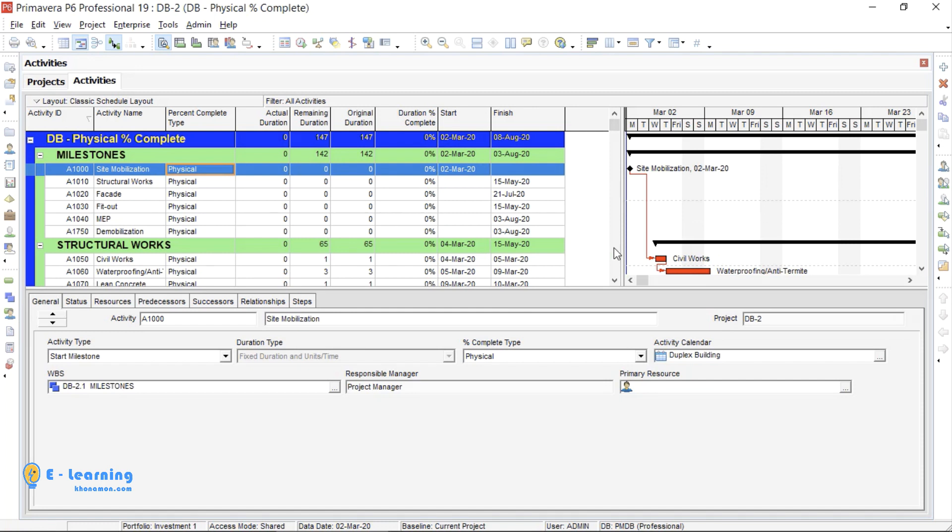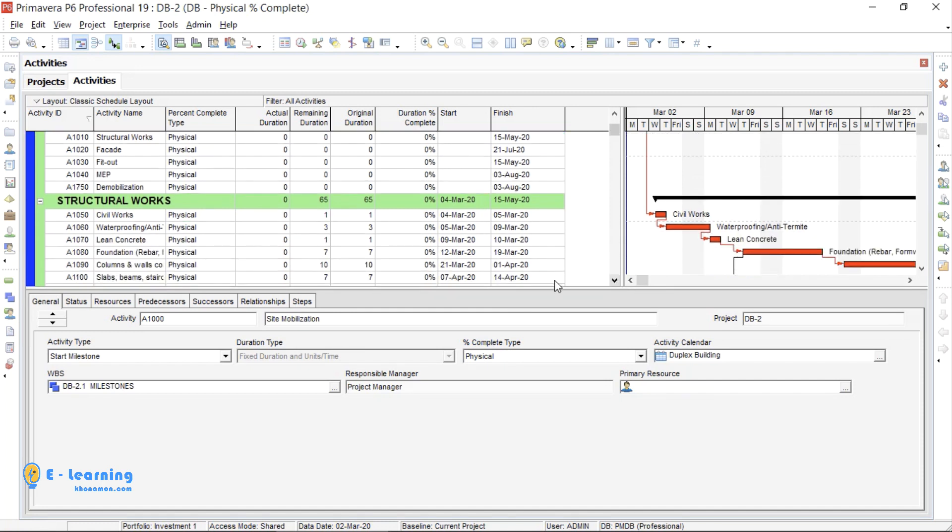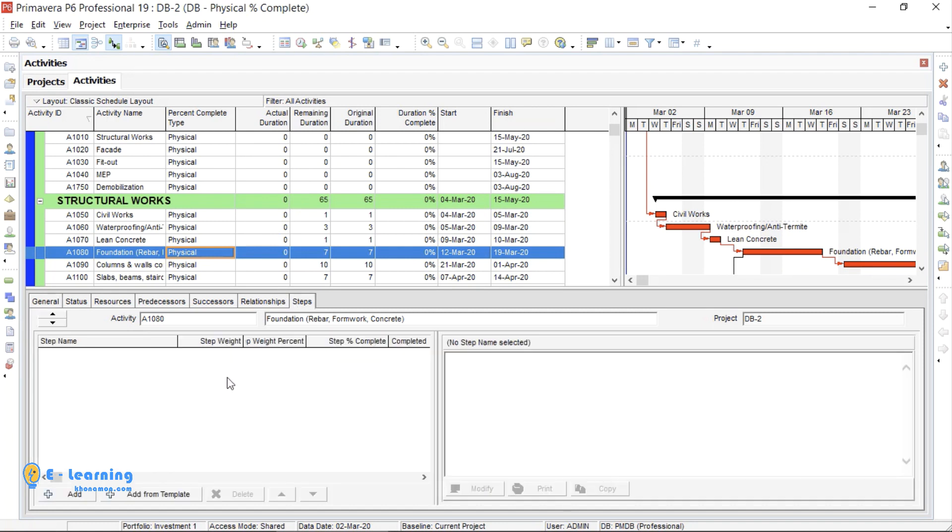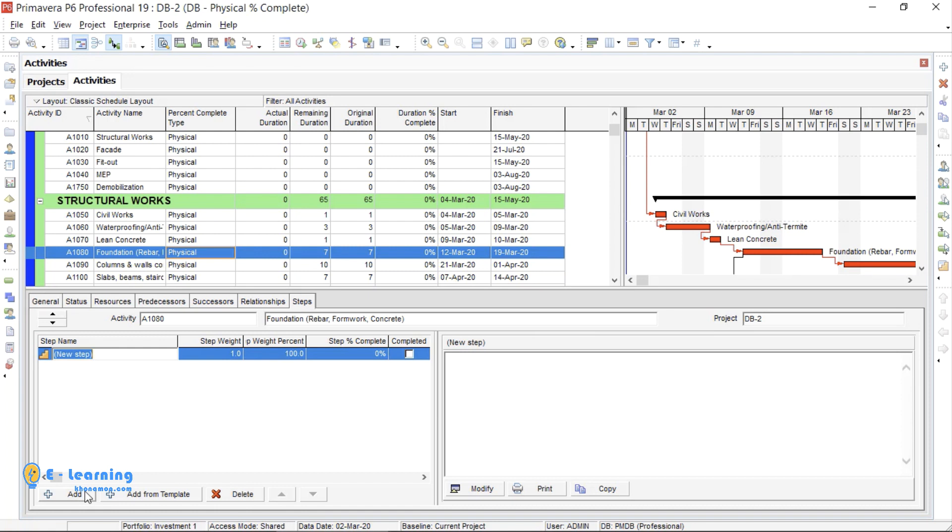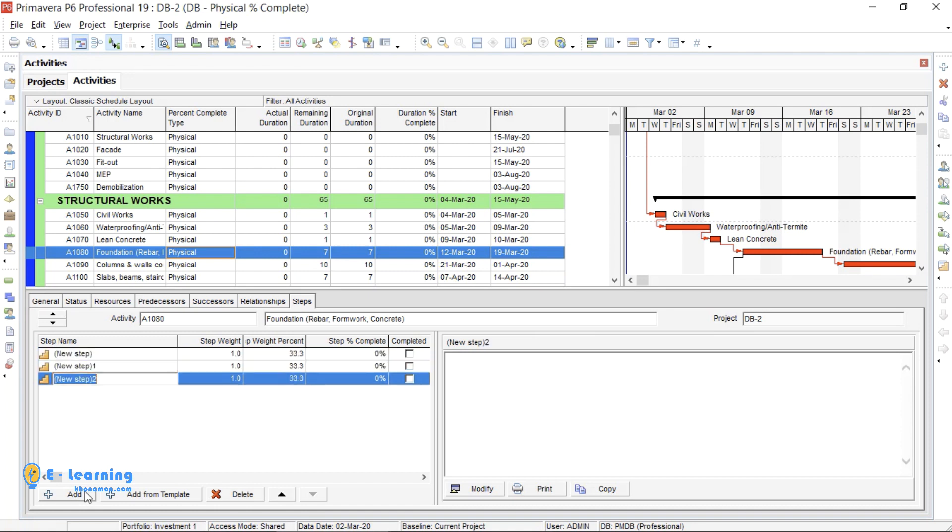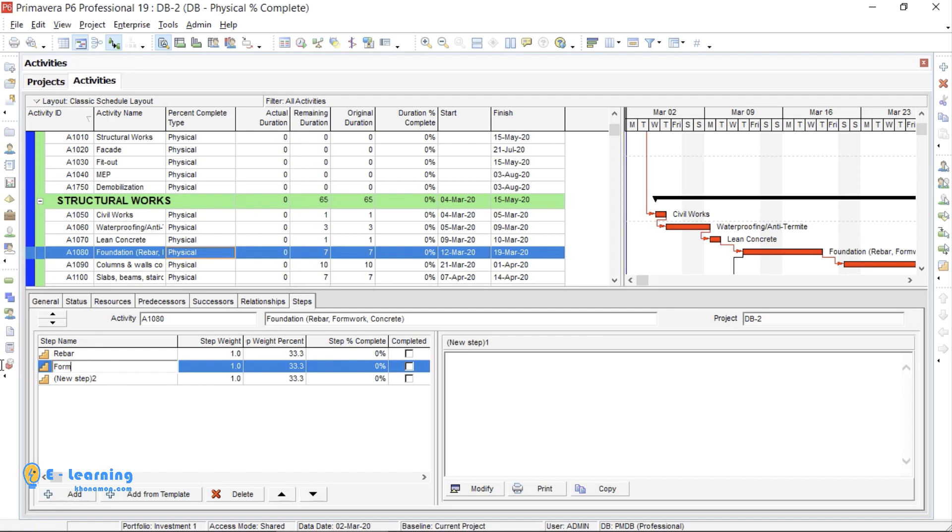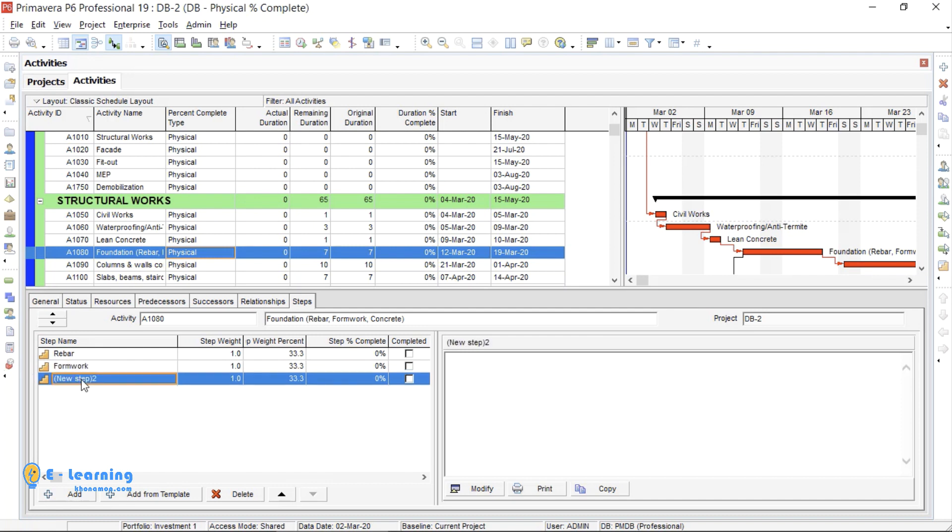Now, select Foundation and in Steps tab, click on Add. This activity, as I mentioned before, has three steps. So, I create three steps and name them: Rebar, Formwork, and Concrete.